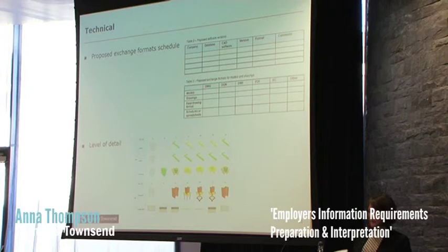So if we look at technical, proposed exchange formats. We're not saying that everyone has to use a particular software tool, but what we're saying is that in our BIM environment, you have to be able to exchange information in certain formats, whether that's IFC, DWFX, PDF, NWC. So we need to identify that. And that needs to align with what the BIM users are, which I'll get onto in a minute.